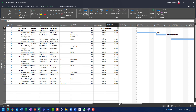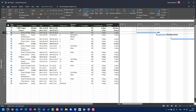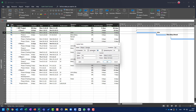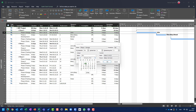Now let's say actual duration is two days and remaining duration is eight days, but instead of 3rd of October my task was actually started on 5th of October. To do that, I go to the Task tab, Mark on Track, Update Task, and I set actual duration to two days, remaining duration to eight days, and change the start date from Monday 3rd of October to Wednesday 5th of October.